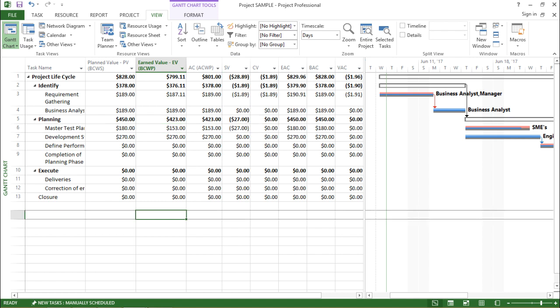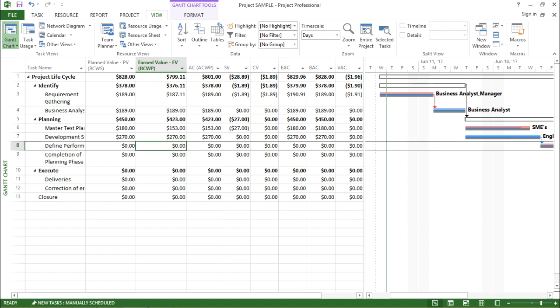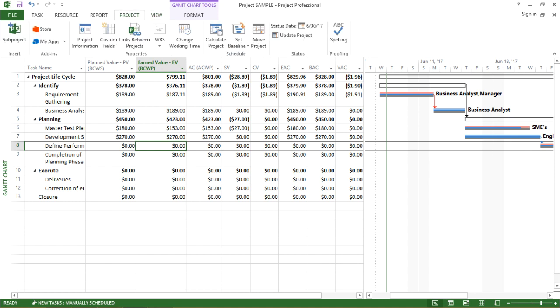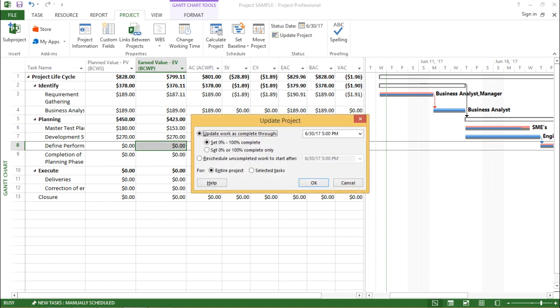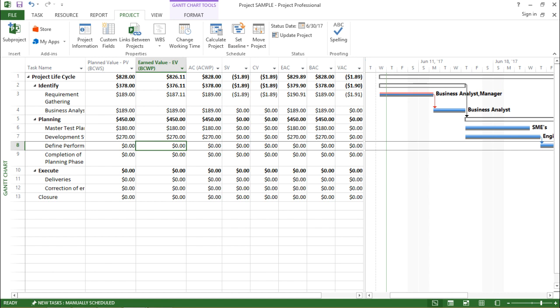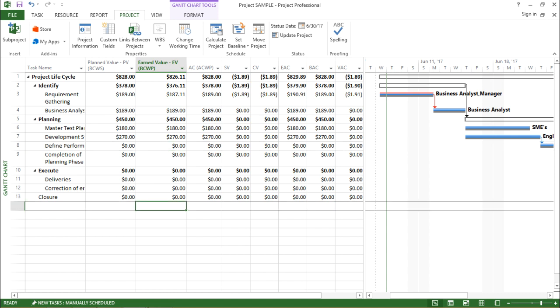Now let me explain these columns one by one, but before I do that I need to first update the project. If I click on the Project tab — my report may already be updated, but if you want to see the changes you have to update the project. Under the Project tab, under the Status group, I'll click on Update Project and hit OK. Now my project has been updated and all the values have been updated up to today's date.